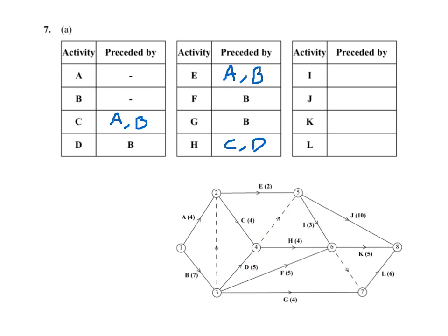So there's three there: E, C, and D. I think that's probably the easiest one to make a mistake on, because that dummy is coming off the end of C and D. J, over here, comes immediately after E. And also, because of this dummy, C and D. So J is E, C, and D.